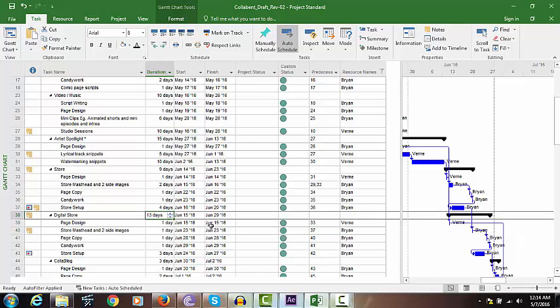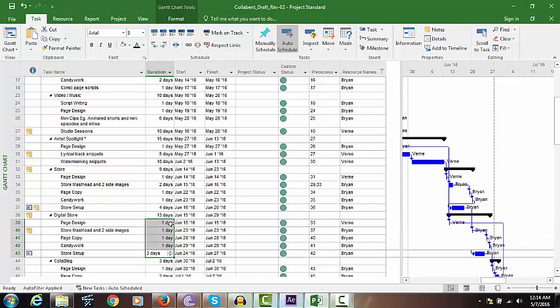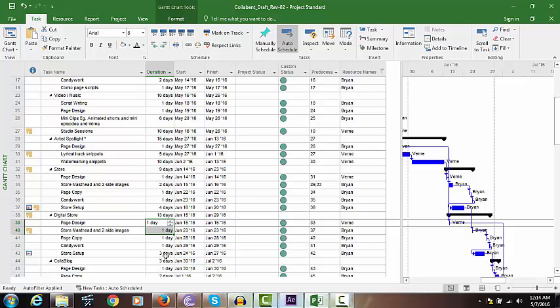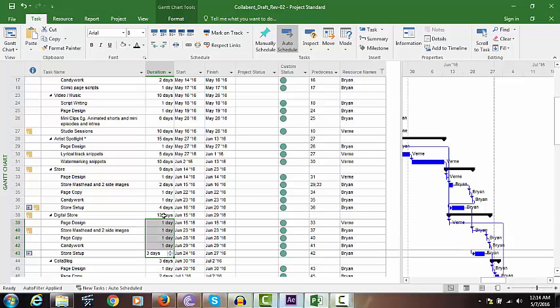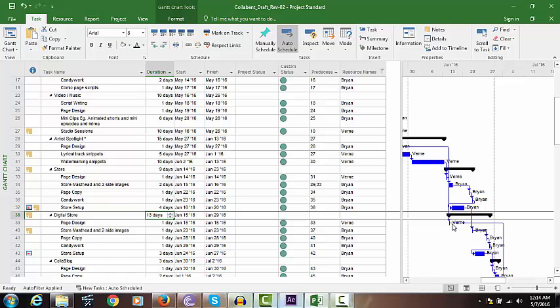Brian, previously you were worried about the durations, which are cumulatively coming quite higher than what they have to be. Like for instance, this 1 plus 1 plus 1, 1 and 3, it has to be like 7 days, whereas it is coming 13. Basically here this awareness activity is starting on some other day, with respect to the activity which is preceding.